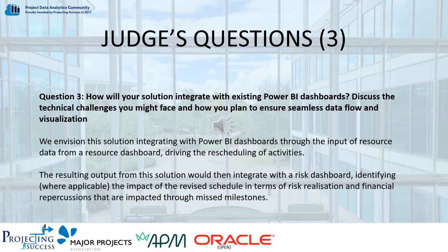The judge's third question related to integrating with existing Power BI dashboards. We saw this as covering two areas, both in terms of input and outputs. In terms of input, the solution would integrate with Power BI dashboards through the input of resource data from a resource dashboard, which would then drive rescheduling of activities. On the other hand, in terms of output, the resulting output from this solution could integrate with a risk dashboard, identifying where applicable the impact of the revised schedule in terms of risk realization and the financial impacts of that.